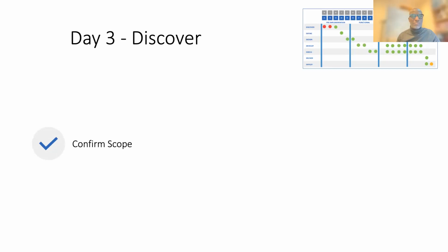What I usually say is that before you start any project, you need to lock down the scope. And if there's any changes, then it has to be a change request. So working within the scope is very, very important, especially when working within ERP type projects. So the first thing we do is I will confirm the scope, and then we'll go on to looking at the details of the questionnaire. We'll spend a bit of time looking at the questionnaire and also looking at the project scenarios.